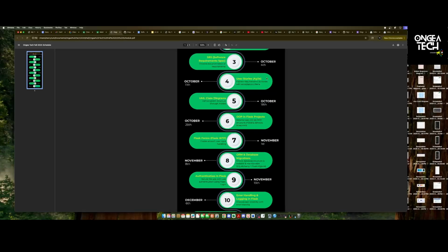I forgot to add that in Agile, you can work in something called a sprint, which is actually the timeline, one to two weeks. Typically two weeks, but in our case, we're using one week because we're only meeting and doing stuff a week at a time. Okay, let me go back. So we pick one story, and that is the one that we're going to implement.